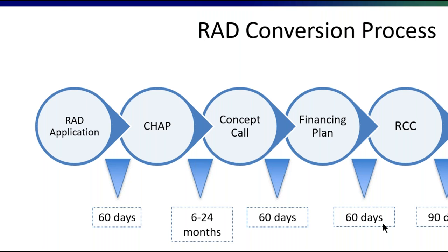then comes a long due diligence period by the PHA where they're doing various local planning and community and resident meetings. They are getting a capital needs assessment. They're taking care of environmental due diligence. They're putting together a financing strategy if their property is going to undertake any new financing.